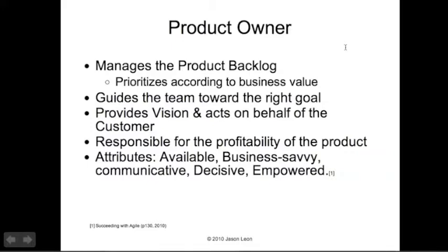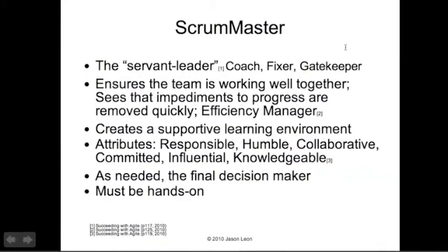That's the core responsibility of the product owner. Scrum Master is the opposite of the product owner, and there should always be a small tension between the two. Whereas the product owner wants the product done faster and with the most features, the Scrum Master is responsible for keeping the integrity of the underlying code in place. So they should be the no man if the product owner is pushing too hard for too many features and the Scrum Master knows that it's just not possible. That's the sort of tension that I'm talking about.